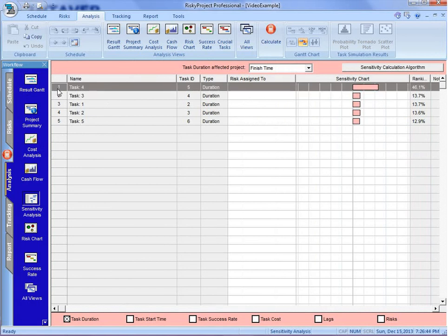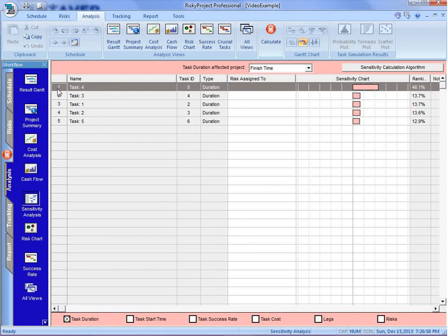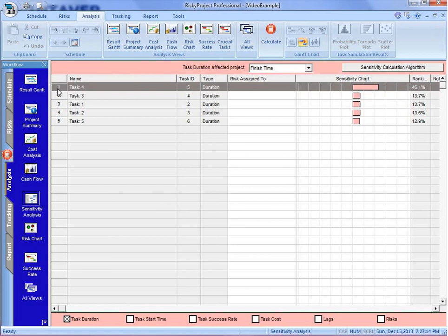This is reflected in our sensitivity analysis, that activity number 4 is contributing most, 46.1 percent, relatively most of the uncertainty that we're seeing in the schedule. That would allow us, if we had a real project, we might go to the person who's doing that activity, or is responsible for that activity, to find out why this task has so much uncertainty associated with it. We might want to take some risk management or risk planning around that activity to try and reduce that uncertainty.